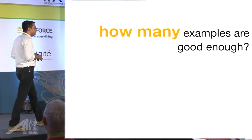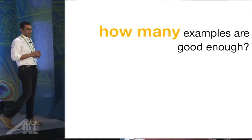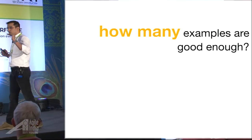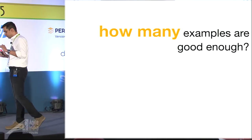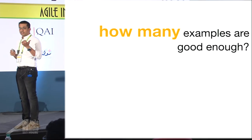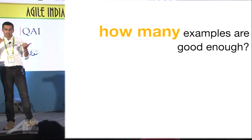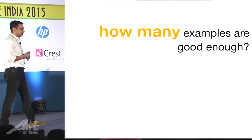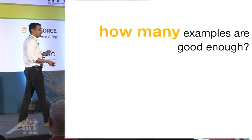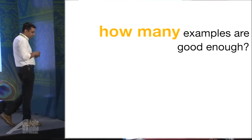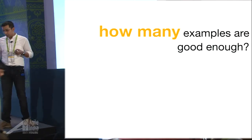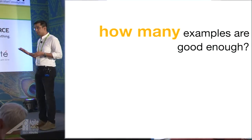How many examples are good enough? Is there a magic number? We tried a lot — there is no magic number. Until the whole team in the PBR session gains confidence that everyone has a fair understanding of all the flows and they've been covered, you should keep adding examples. As part of the discussion, corner cases will surface and should be added back into the examples. This is also going to act as your regression framework, so the more coverage you have, the better the safety net.